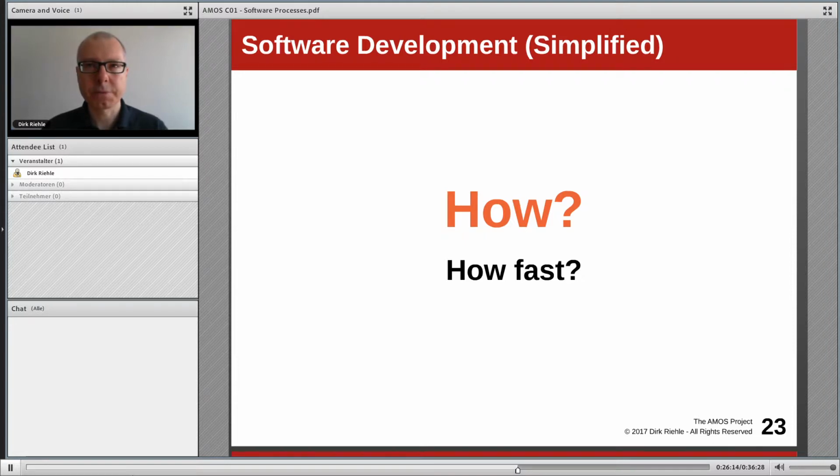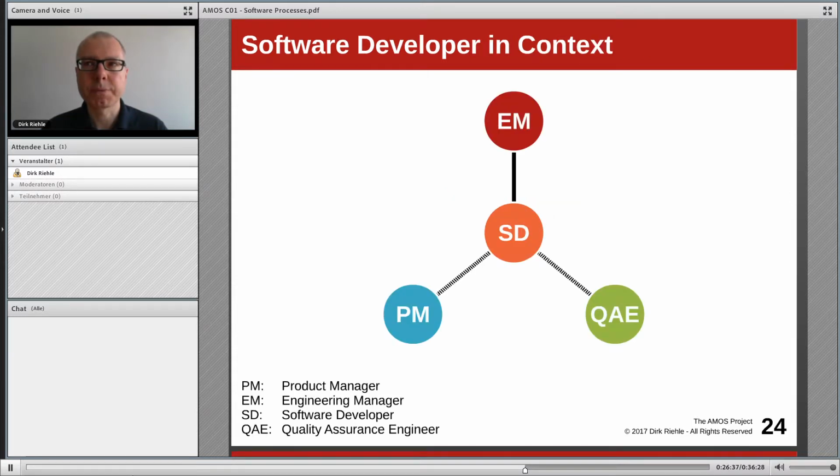can it be done? So in classic software development, you may sometimes have an engineering manager who makes the estimates as to size and ultimately duration of implementation. But in agile methods, we'll see, or you already learned, that it is the software developers who make those estimates, and that's what you manage by.